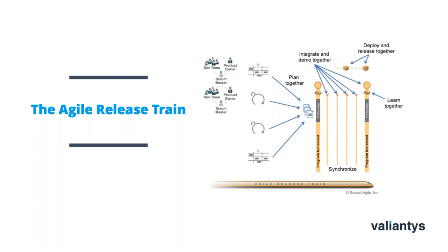So what's the idea of an Agile Release Train? You might remember from the Agile principles having self-organizing teams able to deliver stories. What SAFe tells you is to create self-organizing teams of teams called an Agile Release Train. These teams of teams will consist of both technical and non-technical teams. An Agile Release Train is able to plan, develop, and release features which span multiple sprints and consist of multiple user stories. Those features, again, are part of one or more solutions in a value stream. While a story is time-boxed inside a sprint, a feature is time-boxed in a program increment. The dependencies between features are identified using the PI planning.